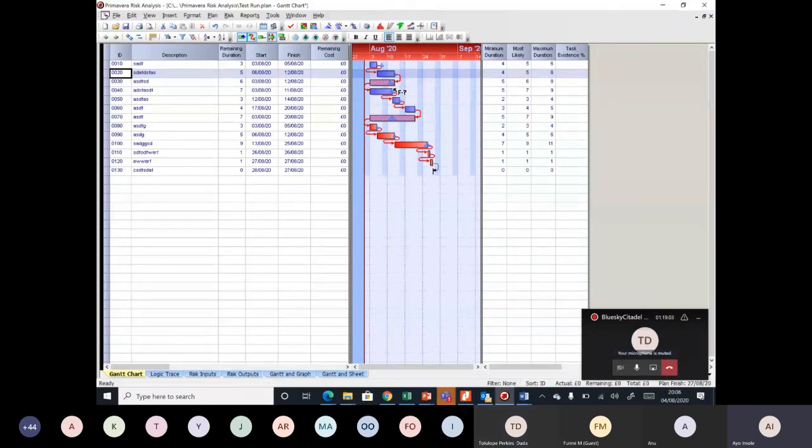When we finish, we're saying that our meeting is 1 hour. By 3 p.m., we will be leaving Westfield together, meaning we're starting the journey together, but that does not necessarily mean we will get home at the same time. That is what is called a start to start. So if you look at 003 and 004, it is what? A start to start relationship, a start to start dependency. So you always have a start to start dependency, a finish to finish dependency, or a finish to start dependency, meaning this activity needs to finish before that activity can start.